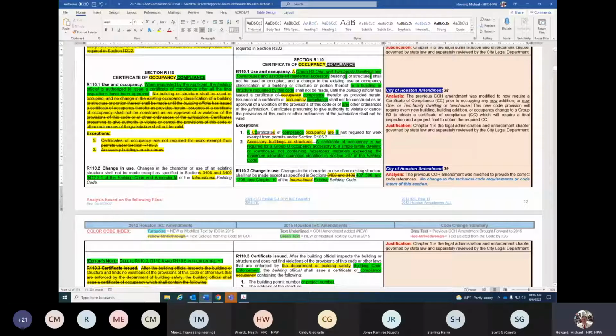One of the reasons is we want to make sure that all the inspections have been completed, signed off, and finalized prior to someone moving in. We have a long history of residential construction not being completed and people moving in and utilizing the temporary utilities to move in their building and then not ever notifying the City of Houston that they're ready for their final inspections. We have literally tens of thousands of projects that never get finalized and closed out because of that.